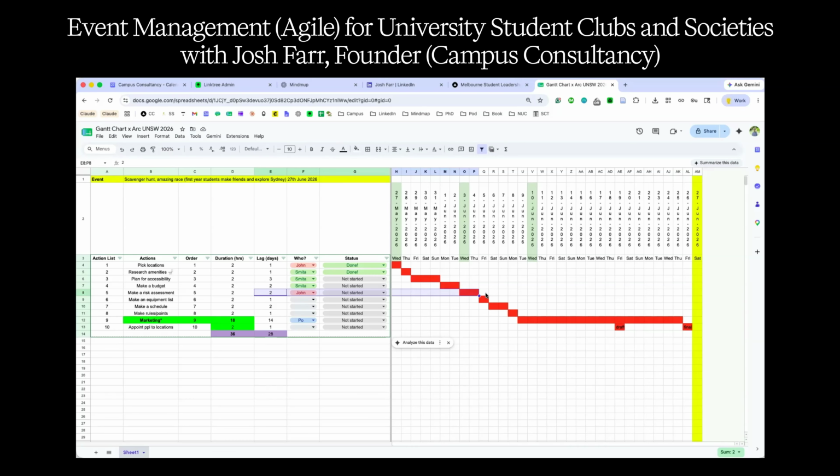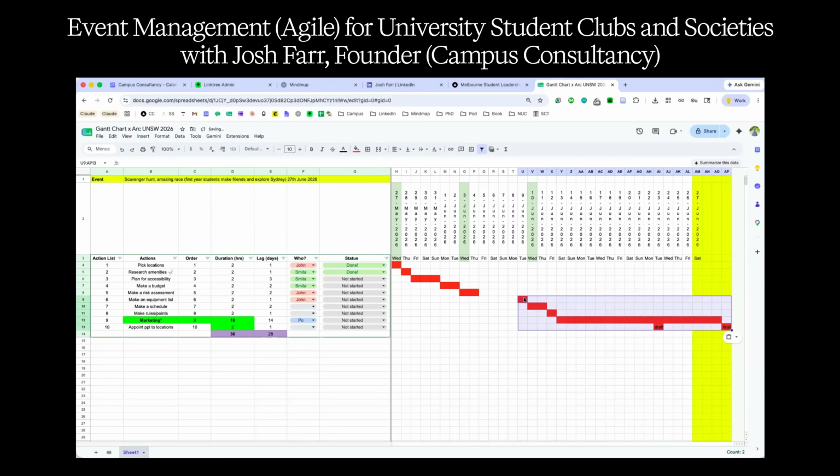That's okay. What we don't want is to get down here when John goes, oh, okay, I actually can't do that on Friday. I work Friday to Monday. I'm totally out. And then the whole schedule gets shifted four days. And all of a sudden, this thing ends up all the way over here. And now our event isn't finished, so we don't have enough time to do the marketing, etc. So if you need to shift a day, that's maybe fine, but we want to make sure it's tight enough so you can visually see it, tick, tick, and hopefully everything's going well.